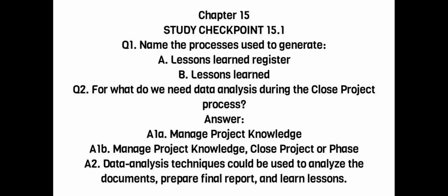Study checkpoint 15.1. Q1. Name the processes used to generate A. Lessons learned register. B. Lessons learned. Q2. For what do we need data analysis during the close project process? Answer. A1A. Manage project knowledge. A1B. Manage project knowledge, close project or phase. A2. Data analysis techniques could be used to analyze the documents, prepare final report, and learn lessons.